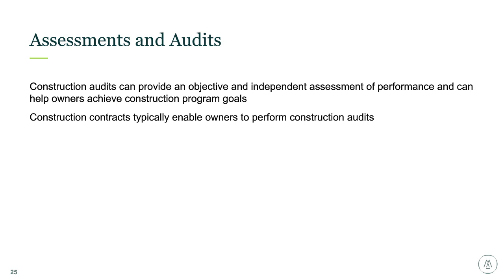So when should a construction audit be performed? Project inception, during the performance, at the closeout. We'll piece this into two areas. So you have the program, which we find there's a lot of value added if you do a risk assessment on what you currently have in place at the program level before you start construction to identify risk early on.